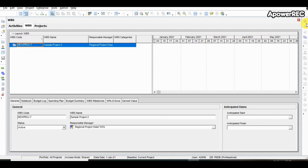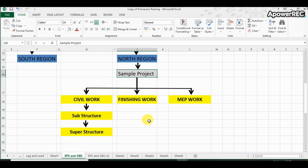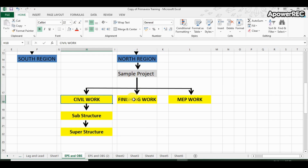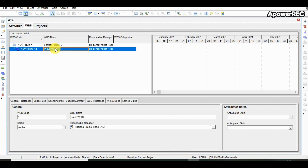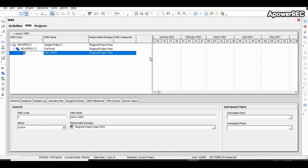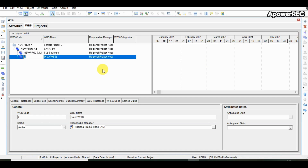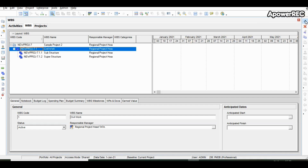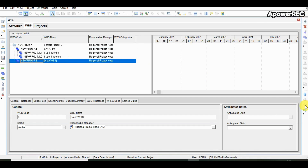To create a WBS we will go to the WBS window and add a new WBS. To systematically manage the program, we have divided the project into civil work, finishing work, and MEP work, and further categorized civil work into substructure and superstructure. This will help us define a large number of activities and manage them effectively. The WBS code is set as default but can be used later for filtering, sorting, and grouping. For simplicity we are keeping it the same.